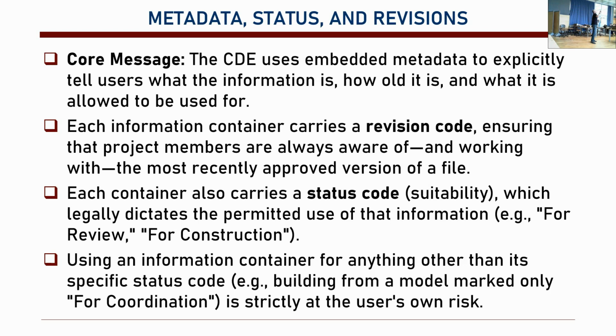For instance, if we are dealing with a symbolic representation of the projector, it could be just a simple box. The size of the projector and its distance from the ceiling. That one could be a very simple geometry, and it's only for coordination. So you don't use it for construction. You can only use it for coordination because it's a placeholder.